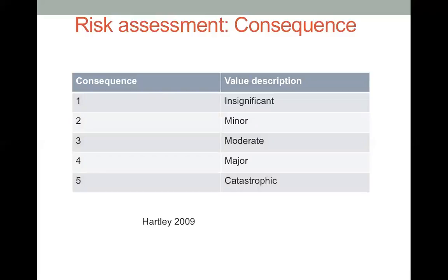Consequence or impact, again, we also rate from 1 to 5. And again, as I discussed before, a 5 rating scale is more sensitive than a 3 rating scale, more diagnostic for us to understand the level of risk. Okay, 1 is normally defined as insignificant. If the risk happens, yeah, we are losing $100. That's fine, we can accept it. Okay.